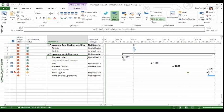Having said that, a lot of times what we would do is open the projects that are considered least important individually. So don't open the group of projects, just open one, and then level the resources in that particular project. And because the others are not open, the leveling function will reschedule the activities in the open project to resolve the over-allocations. So I know that that's a little bit of a long-winded answer, but there are two options there. You still can do it the way that you've described, or alternately, you can just open your projects one at a time, starting with the lowest priority projects, knowing that they will be rescheduled around the higher priority projects. Okay, great. Perfect. Thanks, Dan.